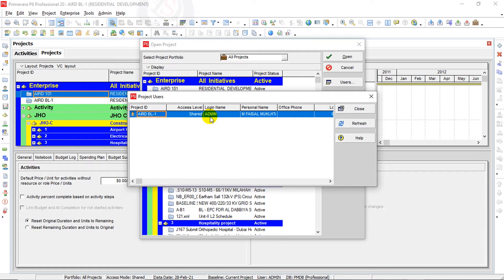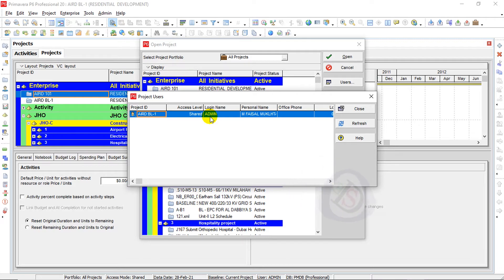So what is Shared Mode and what is Exclusive Mode? In previous versions there were exclusive and shared versions. When you share your schedule or database with other people and your database is not in a standalone position, this problem occurs because the project was created in a database assigned to Shared Mode. Then you imported or exported that project into Primavera P6 where you are using a standalone database, and you cannot change preferences from Shared Mode to Exclusive Mode there.